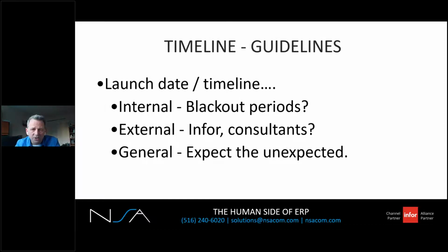So we've got milestones, we've got the team, we've got the deliverables. How do you determine your launch date? Each company has blackout periods: peak seasons, vacation times, trade shows. So be realistic, and factor these in when you're determining your best launch date.